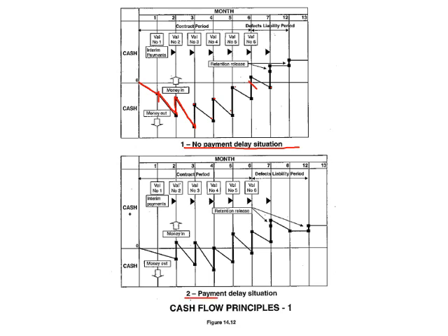But if you can negotiate with your suppliers and your subcontractors that you pay them only later on, you can see how this trend of cash outflow is actually alleviated, so that it doesn't go down as sharply as it went down here in normal circumstances. So you can see after the first month you're actually getting a bit of a positive cash flow, and then you dip back into that, and overall your cash flow deficit is much less.